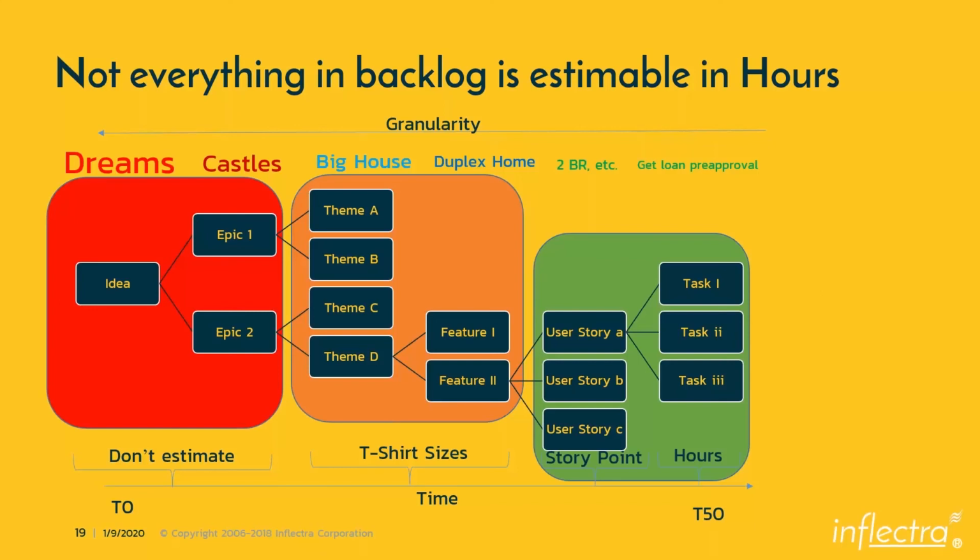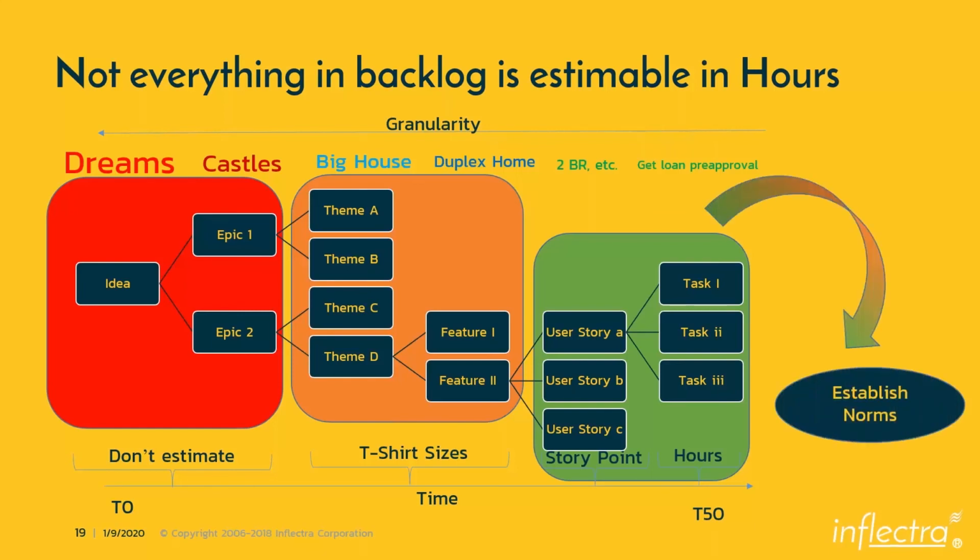One story point should not always be equivalent to 1 hour. It needs to be case specific according to the organization, right? And these things, we have to establish the norms. When these things are not properly done, or the team is in the initial stages, or we are just piloting Agile, we have to establish some of these norms. We can't jump into Agile, saying we're going to do Agile, very quickly. We have to establish certain norms and explain these norms to the people, as part of training and coaching.